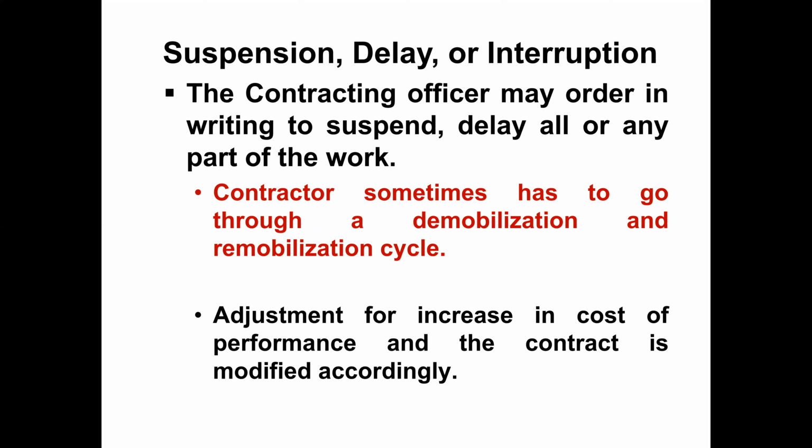Okay. The contractor sometimes has to go through a demobilization and remobilization cycle. Like in the Middle East or in other countries also, if there is a war or something, then projects are going to stop. Then the owner is going to tell them, okay, please stop the project and let your labor force go home. You should remove all your equipment. Okay. So all the equipment, tower cranes, any concrete pump or anything.